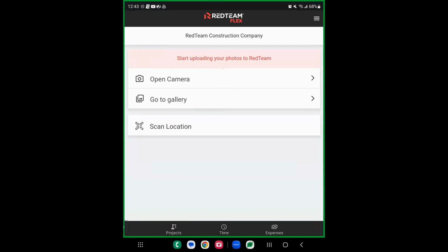So if you're building, let's say, an apartment complex, there are 4 different buildings of the complex. You could create building 1, 2, 3, 4. You could be more complicated than that if you want to as well. You could even make sub locations. A lot of options there, but you'll essentially go in on the web version, progress tab, manage icon, and then go to manage locations, get your location set up.